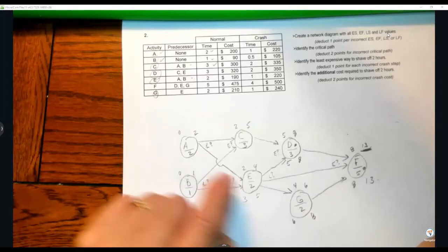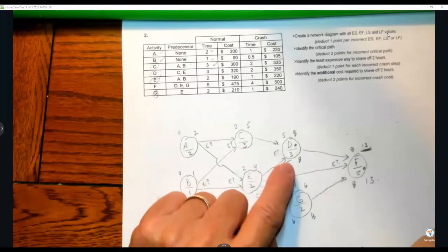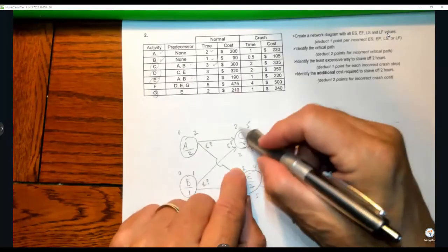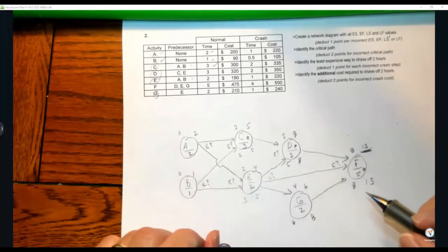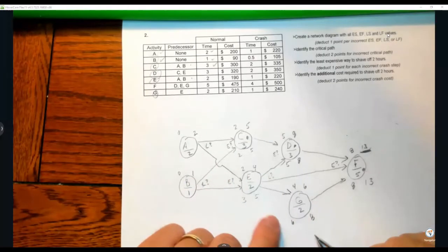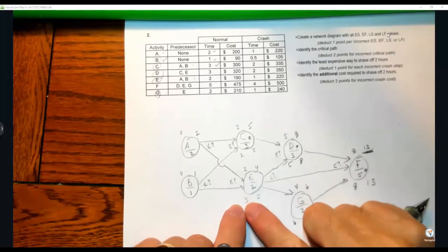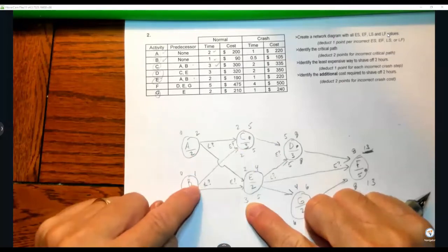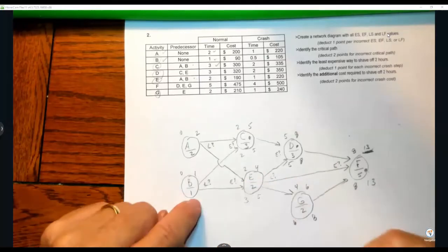Okay. This one, there's no L decision, so we just say 5 minus 3 is 2. Oh, these line up nicely. We know this is on the critical path. Remember, there can be more than one critical path, but we'll see if we have this one done. So our choice is we have 3 back going into this one, and we have 2 going into this one. So we choose the smaller, which is 2. 2 minus 1 is 1, not in the critical path.